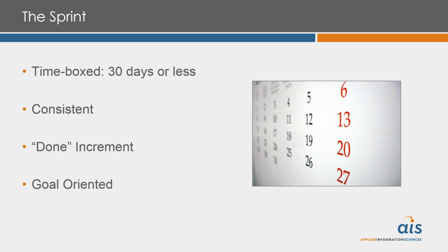The objective of every sprint is to produce a done increment. What that means is we should have everything necessary that goes along with the valuable requests from our product owner should be done. It should be tested. It should be reviewed. It should be refactored. It should be load tested, performance tested. It should be potentially whatever that means to your team, but it could also include usability studies. What it means to be done with an increment or done with a feature is expected to be done within a sprint.